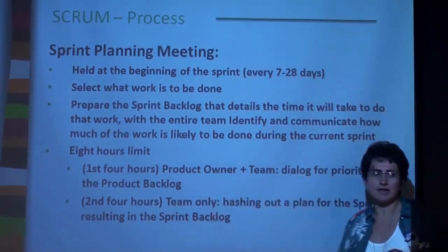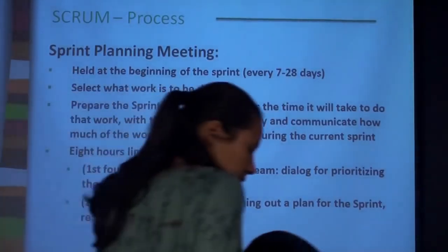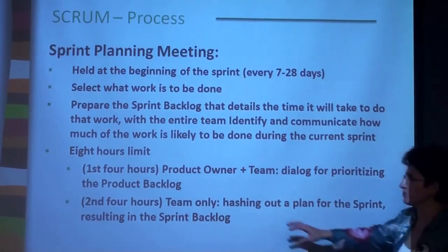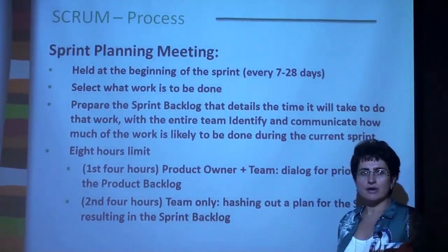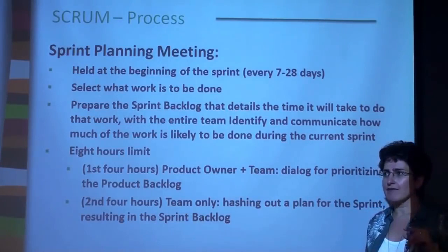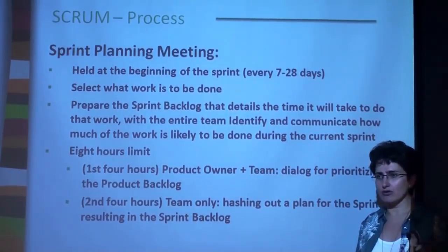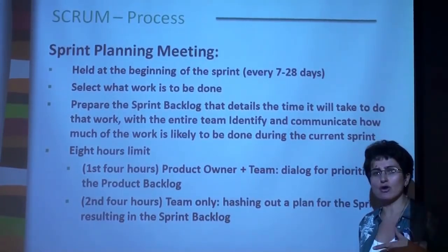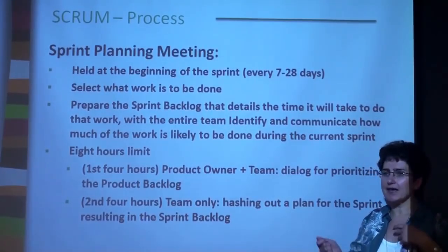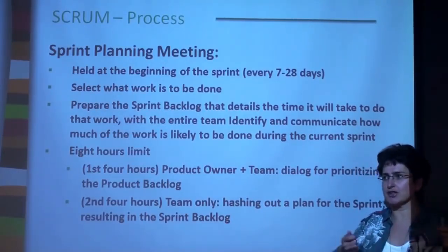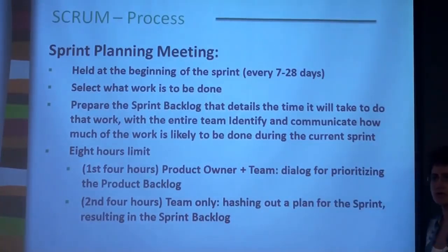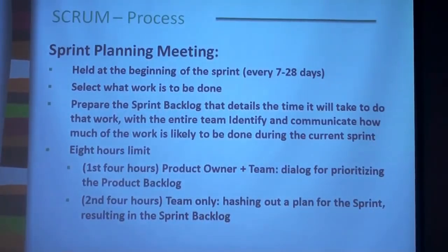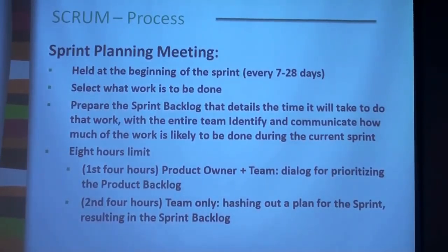And the limit for this meeting is 8 hours. So you should not, as a team, spend more than 8 hours for this planning. Even though, as you can imagine, if you have too many features and all of them have highest priority, and the product owner wants all of them to be implemented, it may take a while to have this discussion and dance with the post-its with the product owner, right?